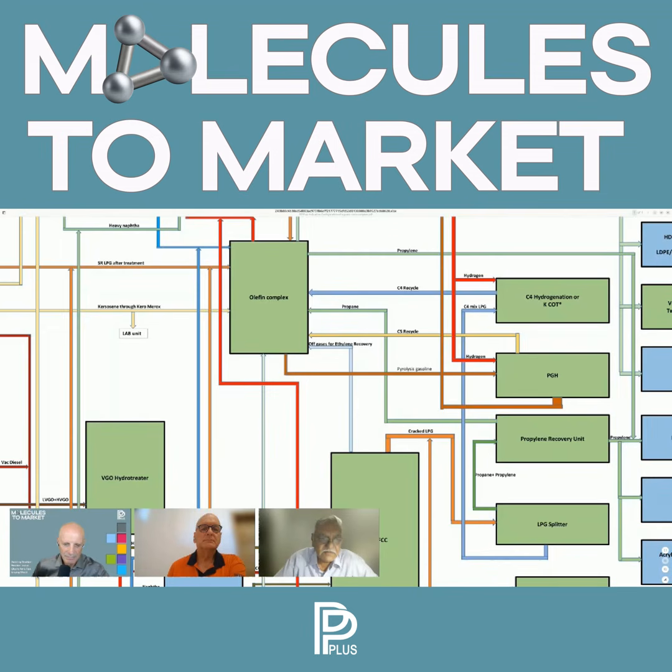That will be done by the federal government, because in many projects, what the federal government does is they waive off taxes, import duty and things like that, because they want to encourage a particular project. So like for Reliance, when they set up this particular project, they had made the customs duty almost negligible. So they wanted to give them an incentive that if they have to procure equipment, then be it so, because the country is interested in having a large project.